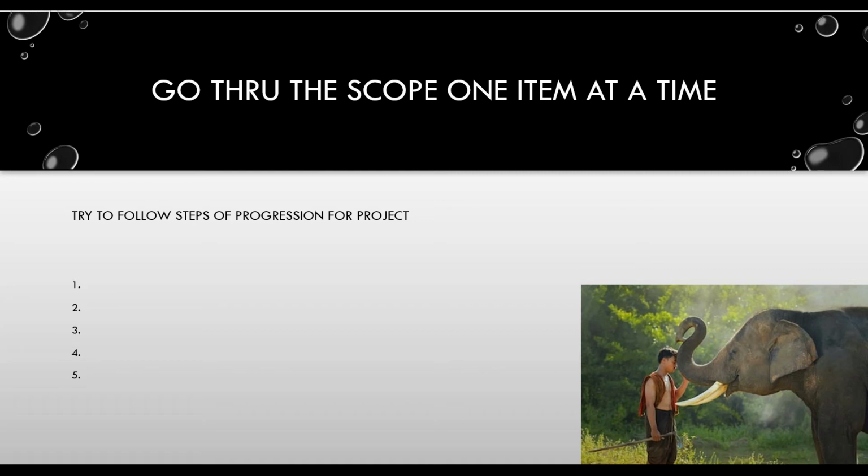So then once you run through it with the thermal imaging camera and you start to find out where the walls are wet, where the floors are wet, where the ceiling's wet, then you can start your equipment placement. Then you're going to do equipment placement mapping. That won't necessarily be done on the first day either. Once you do your equipment placement and get your equipment connected and turned on, now you've stopped further damage to the building. Now you can back up and fill in some of these steps, such as equipment placement maps on the interior.